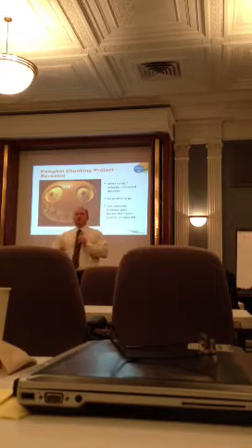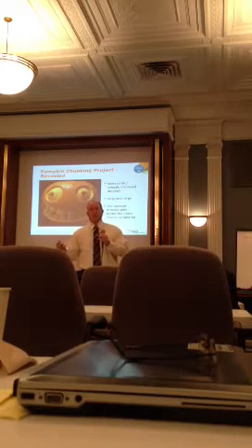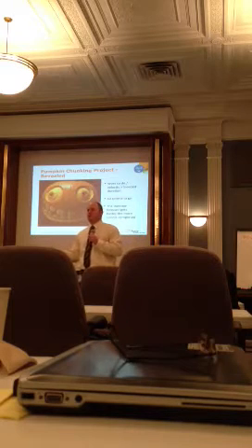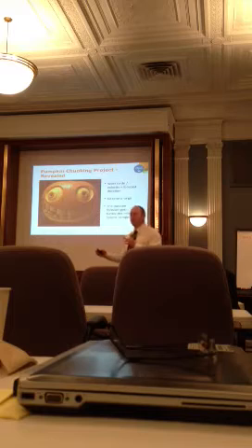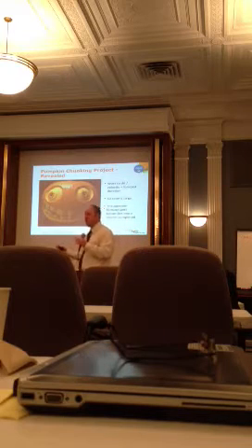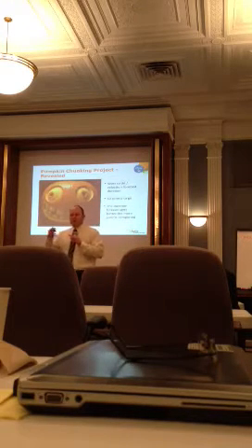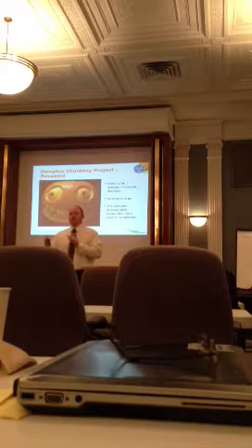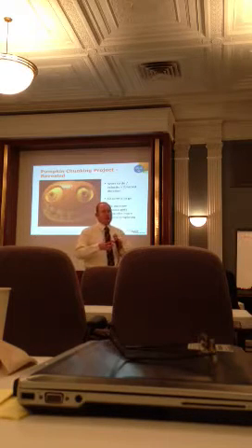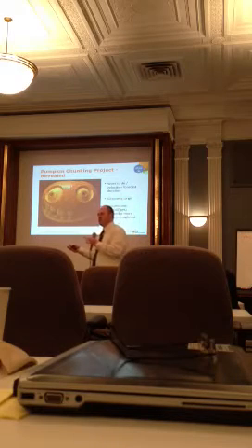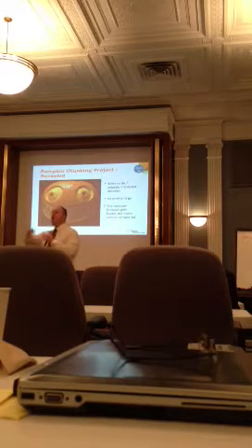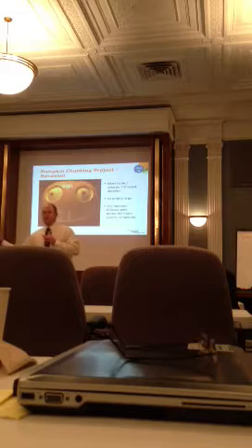That's your velocity. You do an average, and you say it's going to take me about 60 iterations to get through this entire field of pumpkin points, right? So 60 sprints to go. If you do 4 iterations or 4 sprints per release, what's the math there? 15. You're going to have 15 releases to get through all of your pumpkin points.